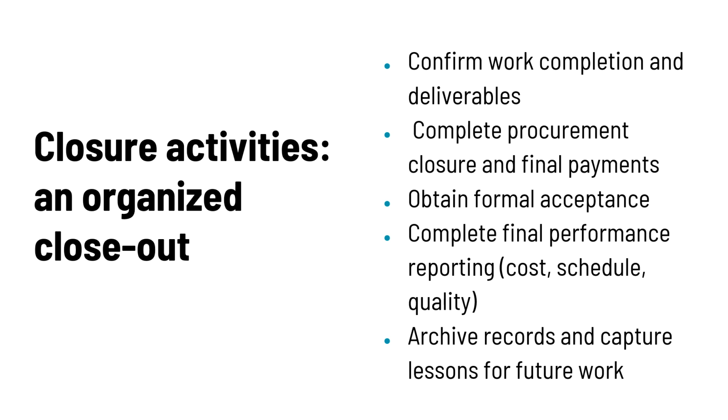This includes confirming work is done, completing any procurement closure and payments, and getting formal acceptance of deliverables. It also includes final performance reporting, like how the effort performed in terms of cost, schedule, and quality. And importantly, it includes archiving records and capturing lessons that can strengthen future projects and future OD efforts.